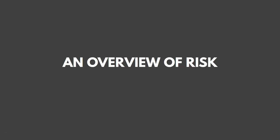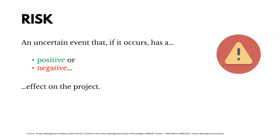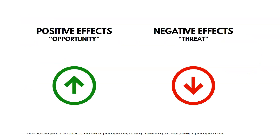A risk is an uncertain event that, if it occurs, has a positive or negative effect on the project. We often think about risk as being only negative, but there are positive risks too — like investing in a stock where it could go down or go up. Positive effects on risks we call opportunities, and negative effects we call threats.